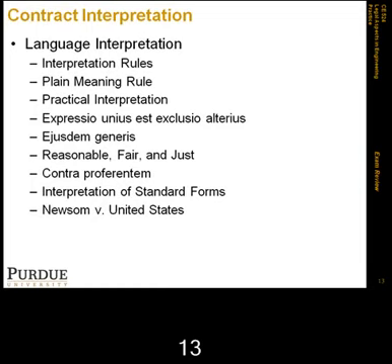The patent ambiguity doctrine is one of those very few exceptions to the contra proferentem rule. So the duty to inquire is created if you face a patent ambiguity, and it prevents contractors from taking advantage of the government. So that was the case, and the decision of the Board of Contract Appeals was affirmed. They denied Newsom the claim because this was a patent ambiguity and created a duty on them to inquire.